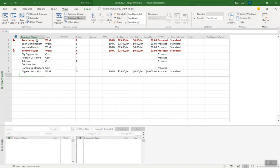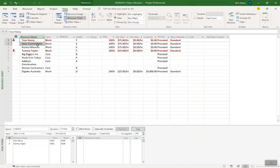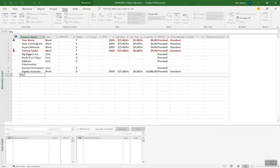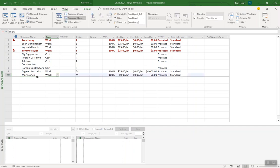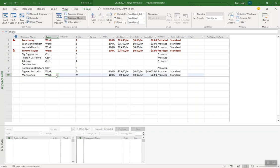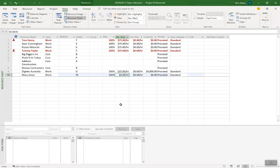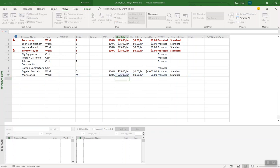So to do that I'm going to come in here and start typing the names of the resources that I want for my project. You see I've already started to do that. I can add a couple more in here. I'm going to add Mary Jones. You can see when you first create them work resource by default. I've got other videos on this but we can create material resources, cost resources, work resources. We can also give them a standard rate. 75 bucks an hour and we're good to go. So build out your resource pool. That's the first thing.